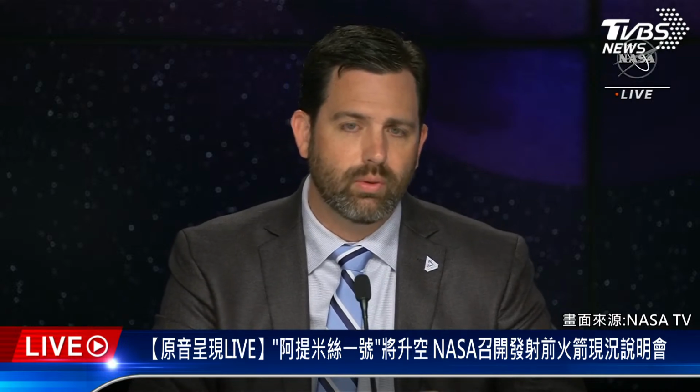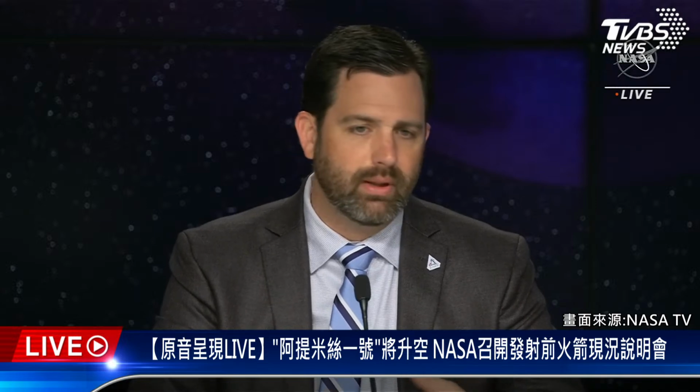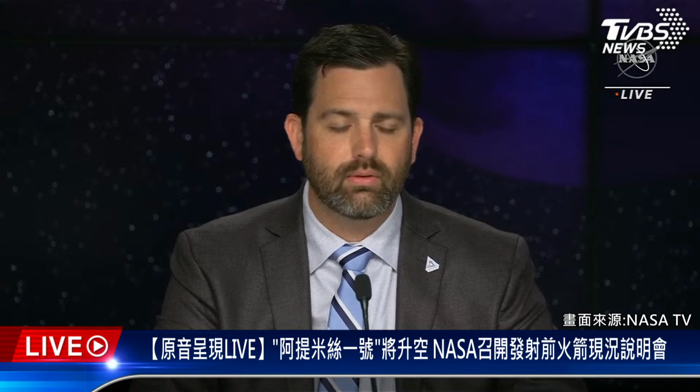And so right now we've done a full inspection of the vehicle. We've noted any nonconformances, and they've cleared any of those for flight. Throughout the count, as we see cryo pumping, things like that, we're going to continue to do the same thing. If anything is anomalous, they note it, and then they turn it over to a debris trajectory analysis team to decide whether or not we have any concerns. So they have standards that they use against, and they have models that we run if it's above those standards. And then just to answer the other question, it was 5:17 p.m.